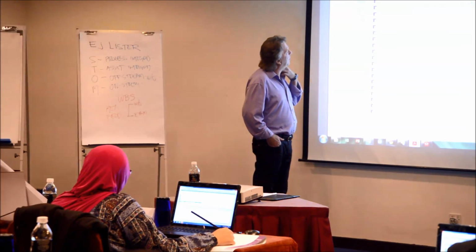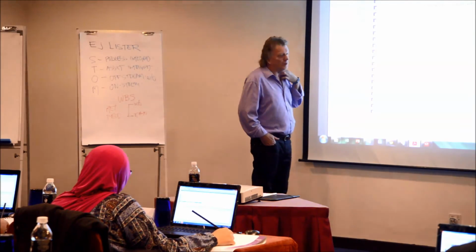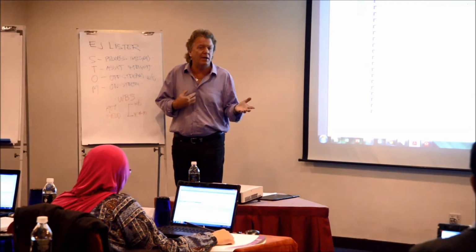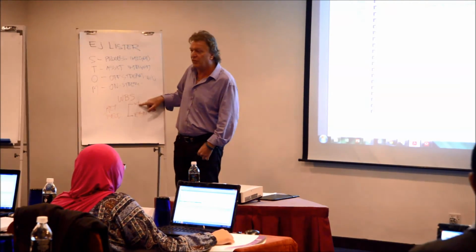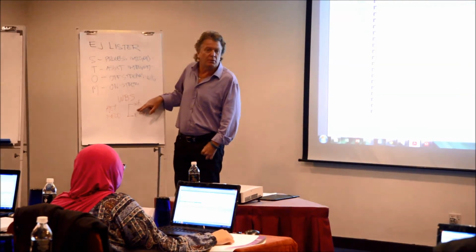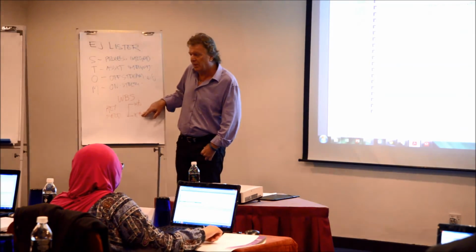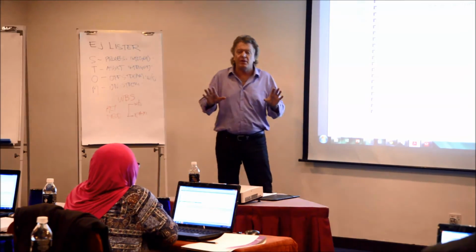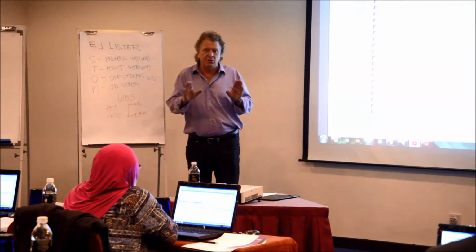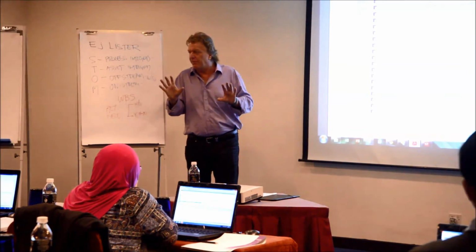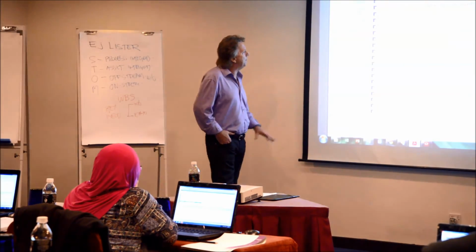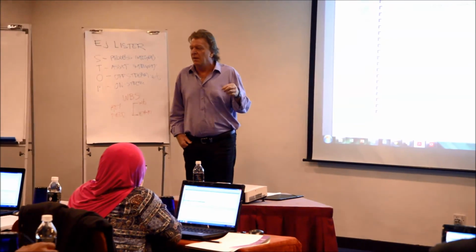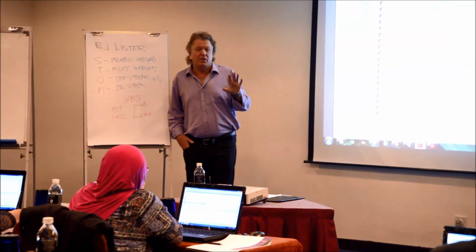Then in lesson 4, we talk about activity codes, because if we don't code the computer, it doesn't know what we're asking. These are two of the codes. The computer wants to know what work order you are scheduling and on what piece of equipment. Then we're going to create some layouts, because in Primavera there are so many options for different fields and different views. And then managing data is more about making filters and grouping and sorting so that I can control my data.